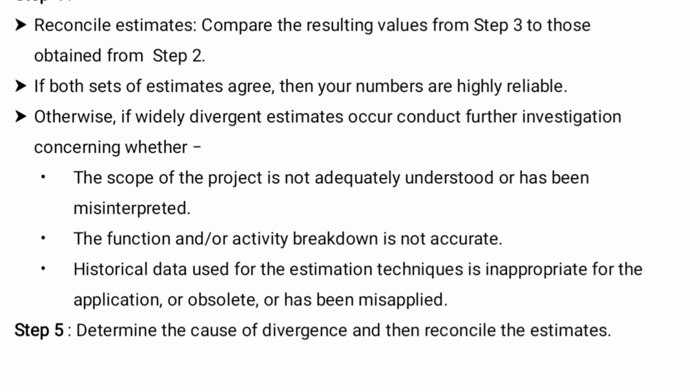Reconcile estimate compares the resulting values from step 3 to those obtained from step 2. If both sets of estimates agree, then your numbers are highly reliable.